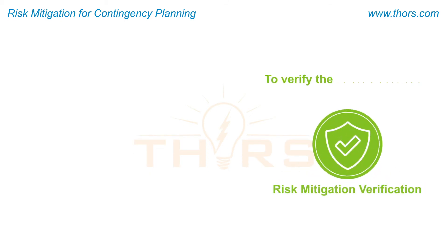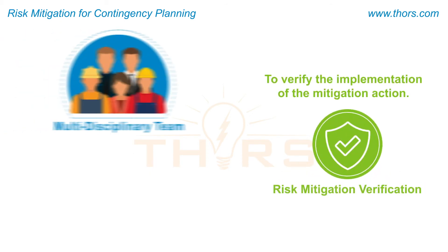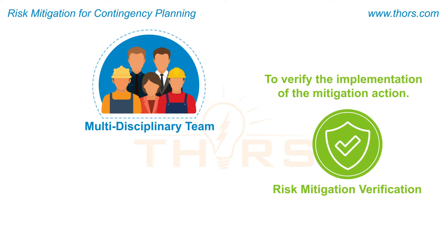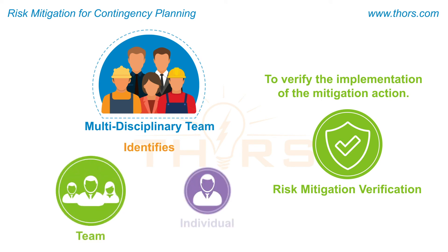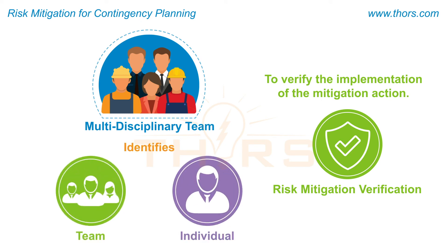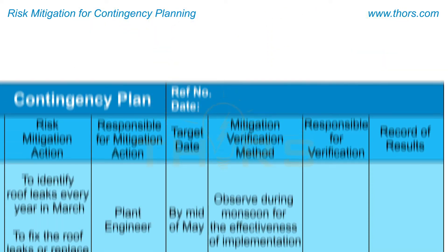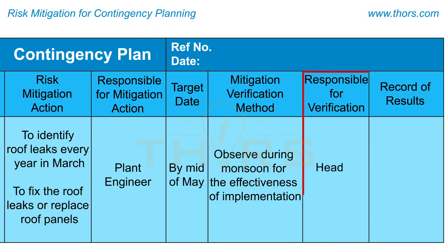To verify the implementation of the mitigation action, the multidisciplinary team identifies the team or individual. For the leaking roof example, the head of production is assigned with the responsibility.